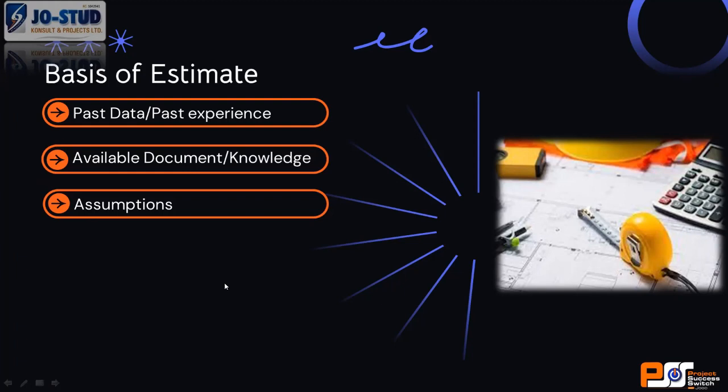per millimeter squared. I will state my assumptions there so that if you are satisfied with my proposal and you now engage me and pay me for service, and I come to your site and I do a soil test or geotechnical investigation on the site, and the bearing varies too much from what I have stated in my proposal, we will now sit down on the table and say, wow, because of XYZ, we may need to introduce Y16 rod rather than the Y12 that I used in my own previous project. So always state an assumption piece. It should always form basis of your estimate.